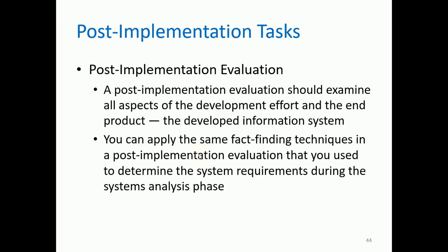Okay, next we have the post-implementation tasks. First is the post-implementation evaluation. It should examine all aspects of the development effort and the end product, the developed information system. You can apply the same fact-finding techniques that you used to determine the system requirements during the systems analysis phase, such as interview, observation, or documentation, and the like.